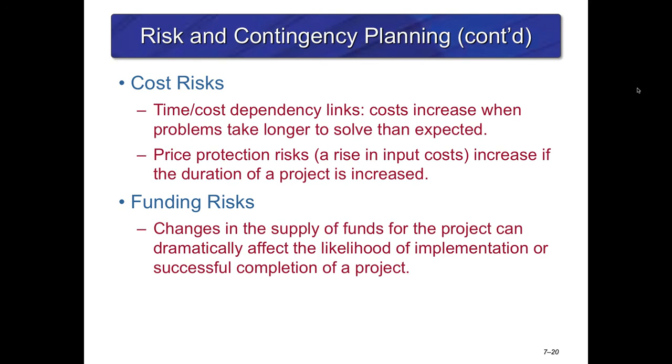The funding risk is the inverse of that. We get through, say, 50% of the project, and we look and say, okay, the cost is going to stay the same, but now we only have $8,000. As a result, the supply of funds has dried up, and so we're not going to be able to finish it. Either way, we still have to come up with extra money. The difference is that with the cost risk, the cost increases. With the funding risk, the amount of money decreases. Okay? So far, so good? All right. Okay.